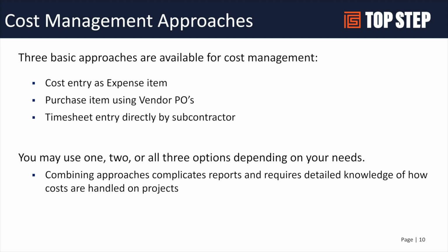You can just get an invoice from your contractor and create an expense report. So you could create an expense item for contractor costs, enter that invoice that you received as a contractor cost item, and then have that as your costing method for the project. So as you're doing your profitability, you would include your expense reports as part of that cost factor.